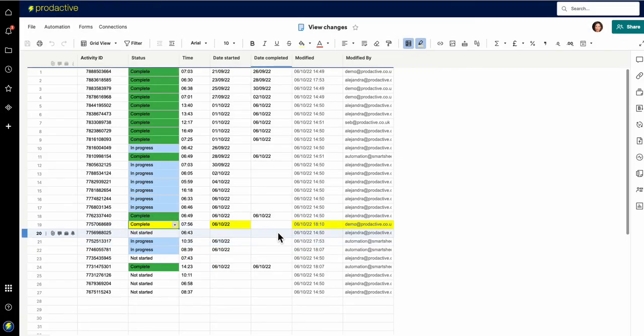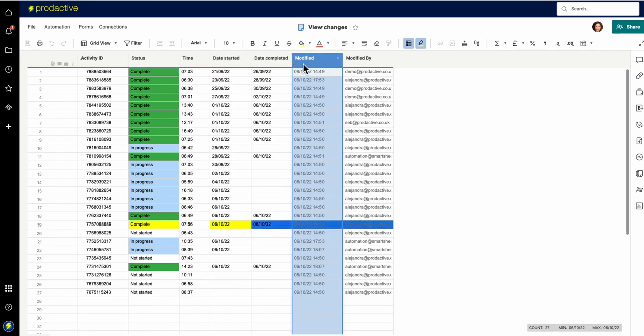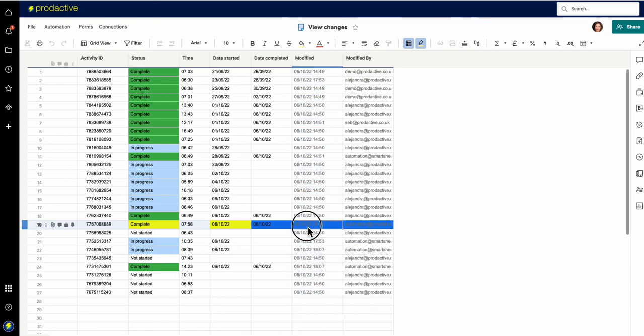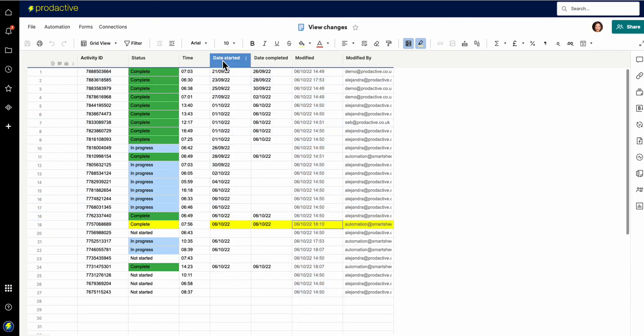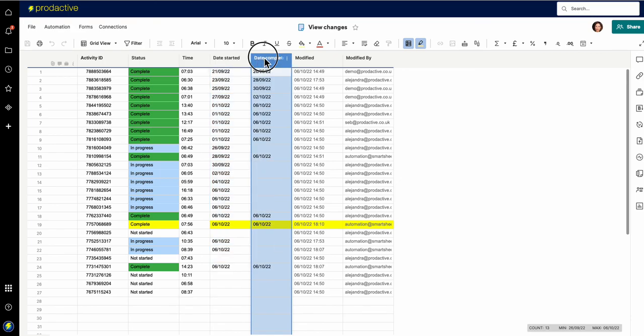If that's marked as complete now, this will be overwritten. So the modified column is great in terms of understanding when any changes were made anywhere on this row. It will show you that change. You lose it though if you want to keep the data for a specific cell. That's when you add in these extra columns here to help you know how long or when did it change to a particular step or stage in your process.